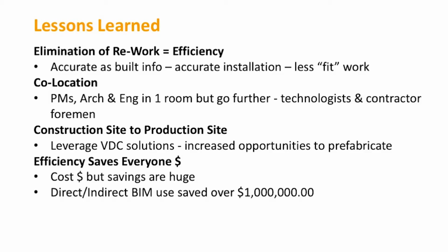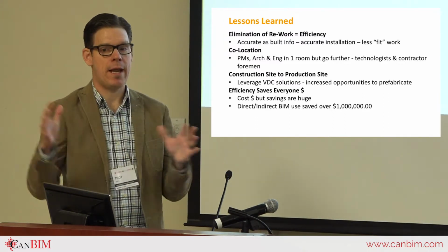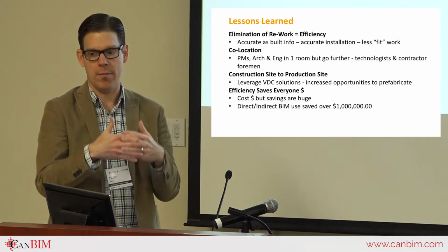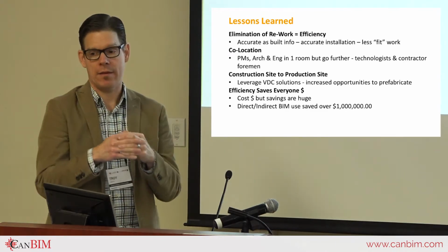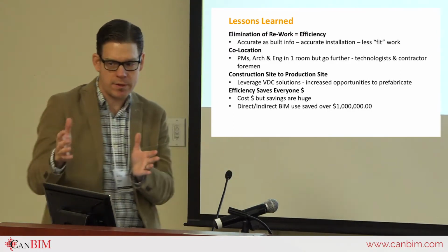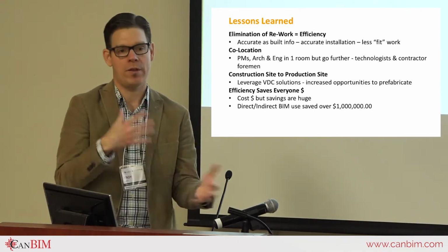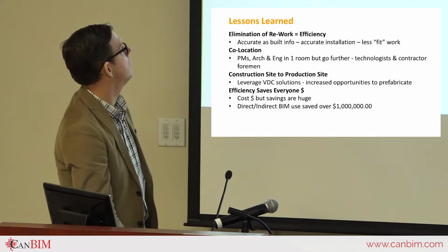So lessons learned on this job, really, the idea of efficiency because of the VDC, the virtual design and construction process. The as-built information is extremely accurate. That was a big one. The idea during the design process, the co-location of mechanical, electrical, architectural, everybody, and then the trades all in a room working together in the BIM environment. It was amazing to get the feedback of all the trades through the design process, saying, why would you guys do it that way? Why don't we do it this way? Because that's more efficient for us from an installation perspective, or whatever the case may be. Those ideas come up all the time, so they can really impact the design in a positive manner.